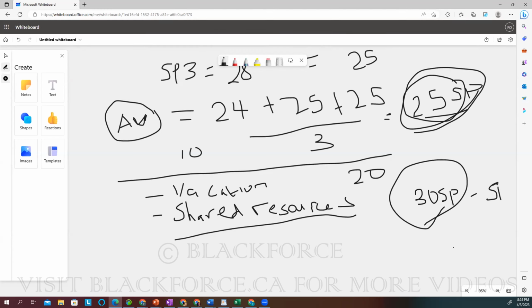But most organizations will use story points. Some organizations will also estimate story points as a number of days. I will show you a sample. They will change that story point into days. Some organizations take 1 story point to mean that you can complete it within 1 day. That's just the way they want to do it. They can put it in different forms, but most organizations also use story points.